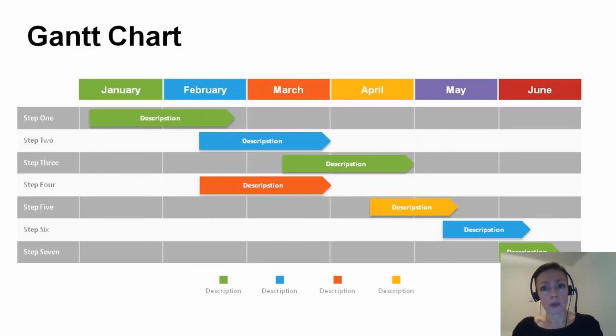Work packages are further elaborated in the Gantt chart to present their timing independently as bars on the time axis. A more detailed version can highlight the critical activities and time flows. The Gantt chart is useful for visualizing and tracking the overall project progress.